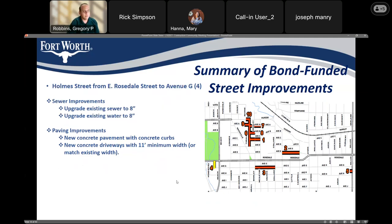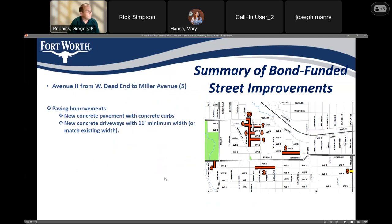More streets funded by the bond: Holmes Street, highlighted on the left — on this street we're upgrading the water and sewer under the street and providing new concrete pavement with concrete curbs and new concrete driveways. Avenue H, in the bottom right corner of the map, from the dead end to Miller Avenue, will also be getting new concrete pavement with concrete curbs, and driveways redone with an 11 foot minimum width.